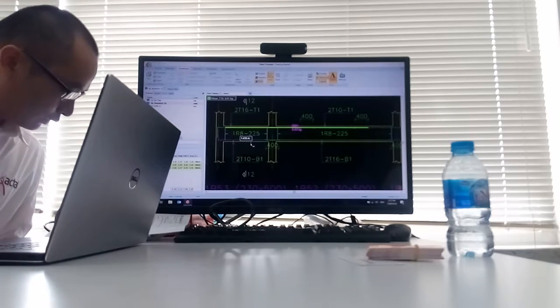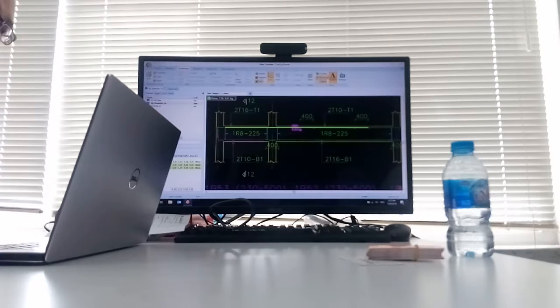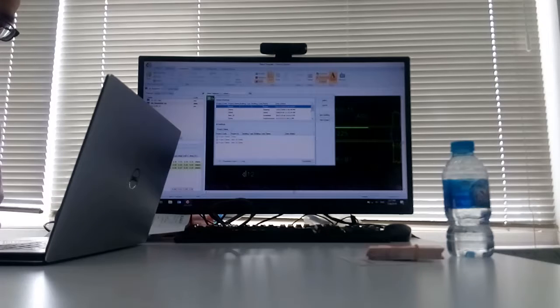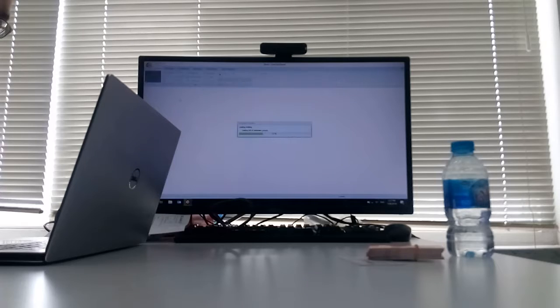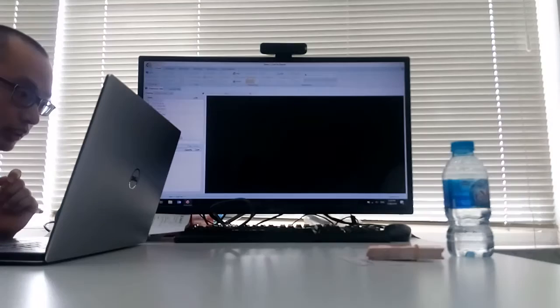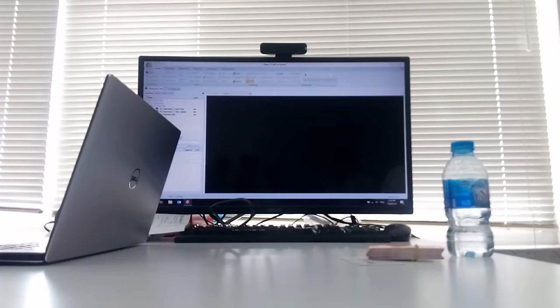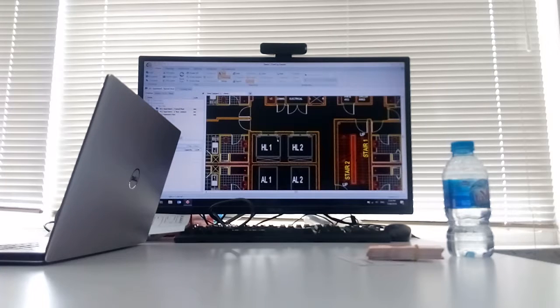Okay, so the next one is the masonry work. Calculate the wall beam, it might be checked manually. For the masonry work, I'll show you inside here in this demonstration. When we want to measure that, we need to have the proper drawings for you to do the proper deduction. So let me open up the sample here. Typically we'll have to look at the floor plan layout, the RCP, the structural drawings, both drawings. So you need a few to work together with.